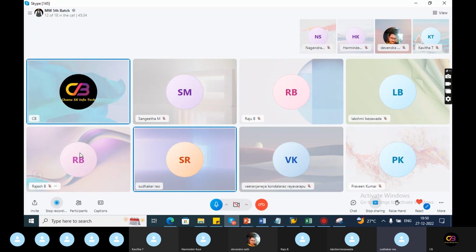Here we have 5 phases: project preparation phase, business blueprint, realization phase, final preparation phase, and go live and support. In the project preparation phase, first we need to set the goals and do the planning: how much time it will take and how to complete the project within the time. We will interact with the client. Once our consultants finalize it, we will go to the client place and interact with the clients. So we will do a kickoff meeting, an introduction meeting with the clients. In the project preparation phase, we will build the infrastructure also.